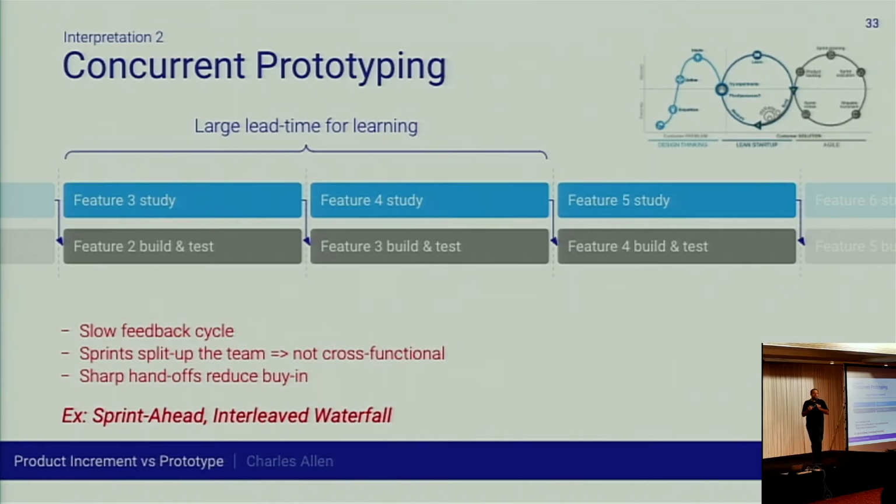You're creating sub-teams. You're creating a team that's working on design and a different team that is working on development, that's working one sprint behind your design team. For simplicity, I've just got 2 interleaved steps. But if you had separate user research, design, build, test, deploy, you could imagine that this becomes, again, an interleaved waterfall. So a set of waterfalls, one after the other.